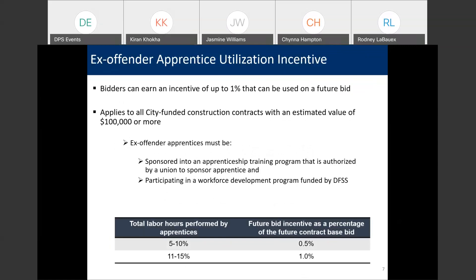Now we're going to talk about the ex-offender apprentice utilization bid incentive. Just like the previous one, vendors can earn up to a 1% bid incentive. This incentive provides an opportunity for ex-offenders in our community with a path back into the workforce. We work with delegate agencies who receive funding from DFSS to screen, recruit, and approve potential candidates. If prime contractors commit to utilizing apprentices who are in the apprenticeship program sponsored by the union, then at the end of the contract, if 5 to 10% of the total labor hours were performed by those apprentices, a vendor can earn a 0.5% bid incentive. If 11 to 15% of the total labor hours were performed by apprentices, a vendor can earn an incentive up to 1%. This credit is earned throughout your performance during the contract, and we will monitor compliance and give you an earned credit certificate at the end of the contract.